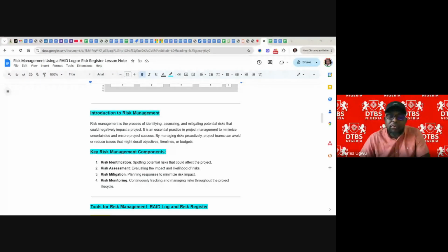Your first planning will be around, let's say, 6,000 or 7,000 pounds. You plan your whole project around 7,000, although you are given 10,000. If the program manager finds out you do not have a buffer or a contingency plan, they can sack you because you don't have good risk management.